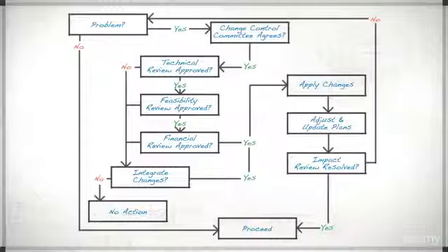If a change is not approved, considerations may take place to drive change activities in a separate project, or there may be no action at all. If a change is accepted, the change needs to be retrofitted into the project, and all project processes used to develop components of the project will now apply to what needs to be developed within the change.